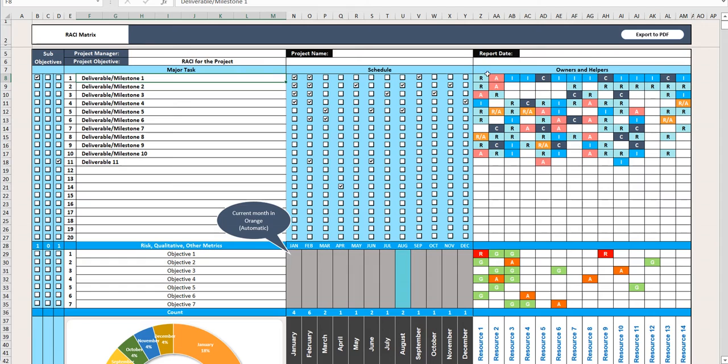Generally, a responsible person is the person who will take care of the ticket, I mean, the first level of person who will be working on the task. Accountable could be someone like an operations manager or a project manager. Informed is someone like a functional manager, someone who is just for an FYI. Consulted is almost like an SME. So that's generally how it works.